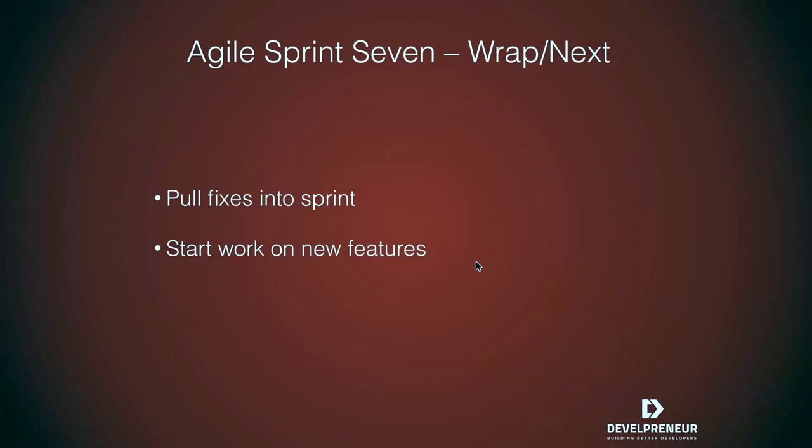And so you can pull items in roughly. You're going to schedule things in a sprint saying, okay, this is what we want to tackle, and we think this is what can be done in that period of time. And then the team, as they get time to work on stuff, they'll start pulling stuff off the board. And if there's something that's left over, it may be that it will just move into the next sprint, or maybe it gets back on the backlog and comes in a sprint or two down.